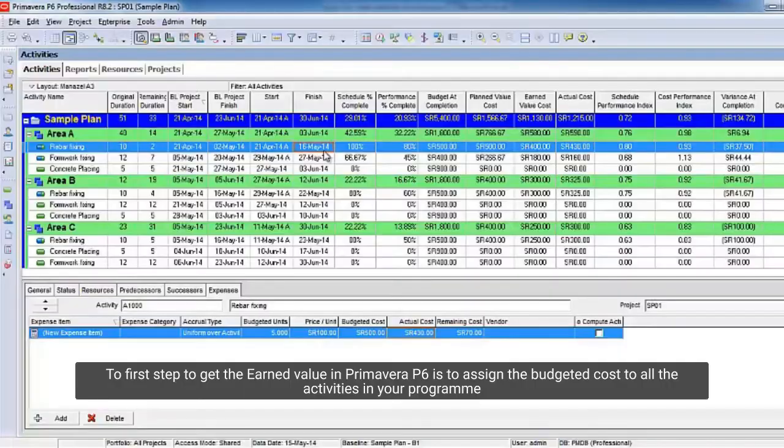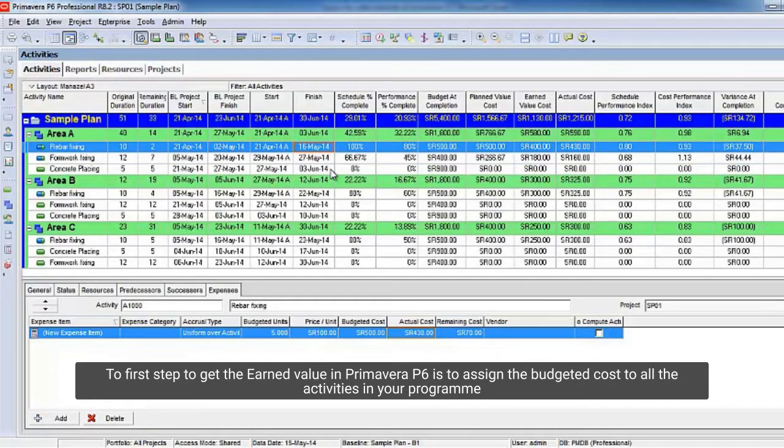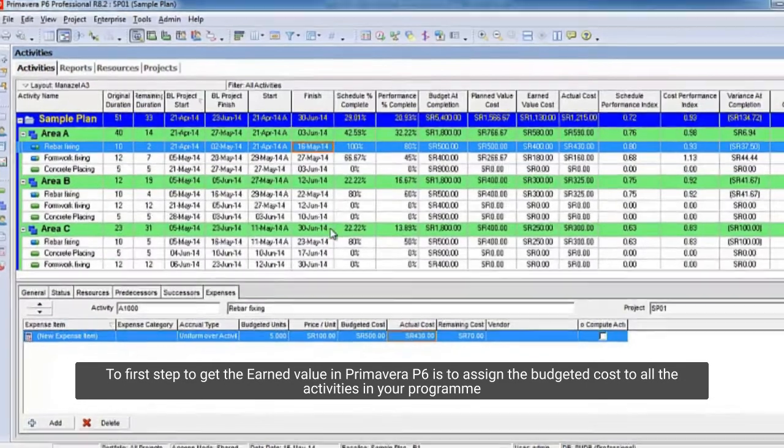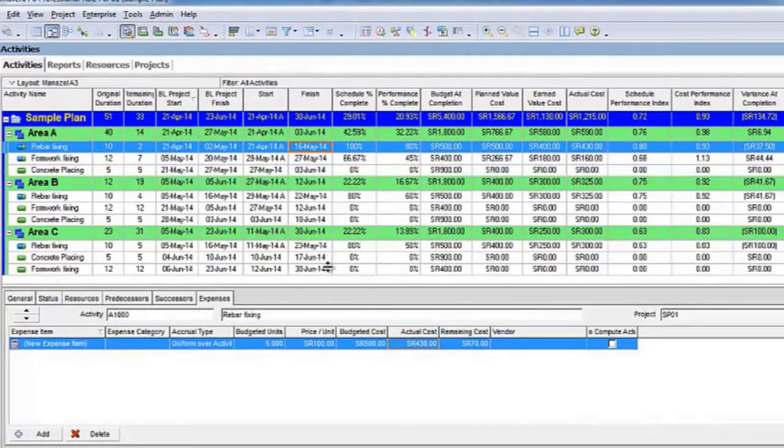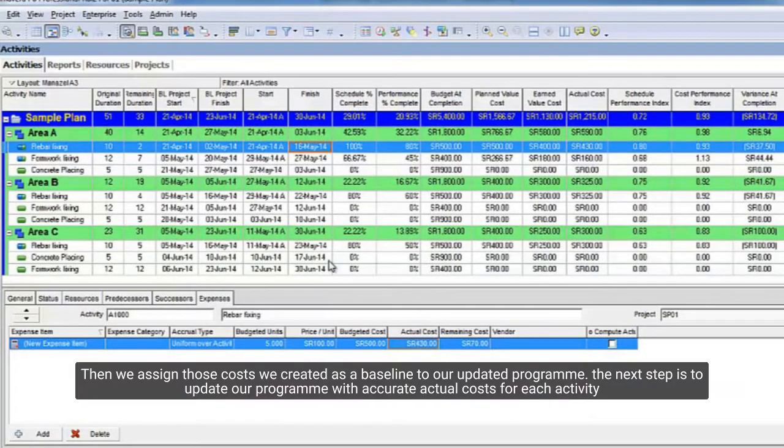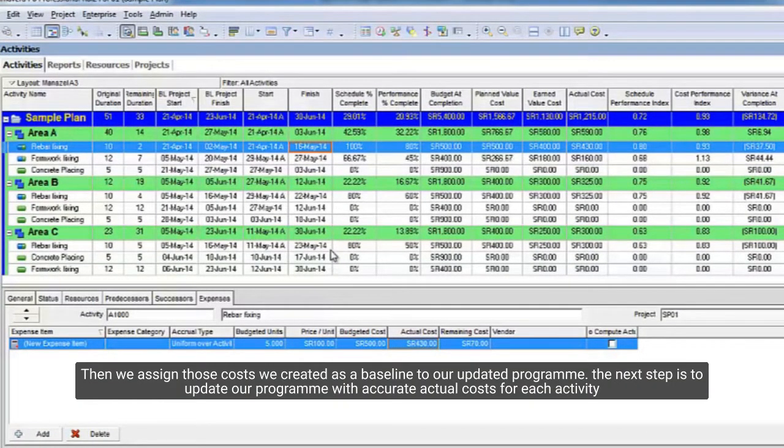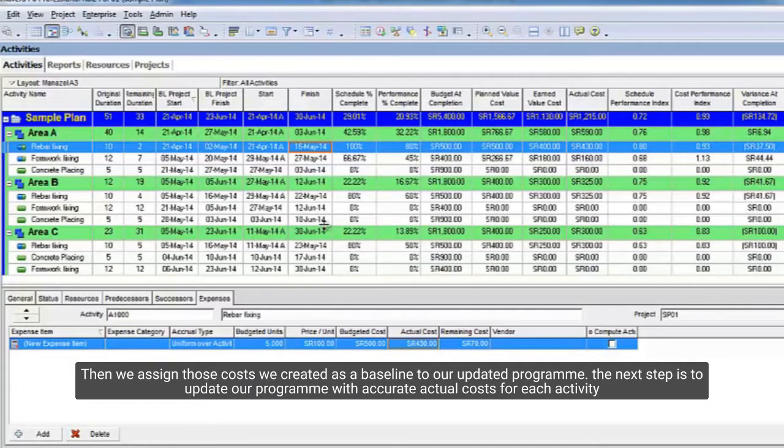The first step to get the earned value in Primavera P6 is to assign the budgeted cost to all the activities in your program. Then we assign those costs we created as a baseline to our updated program. The next step is to update our program with accurate actual costs for each activity.